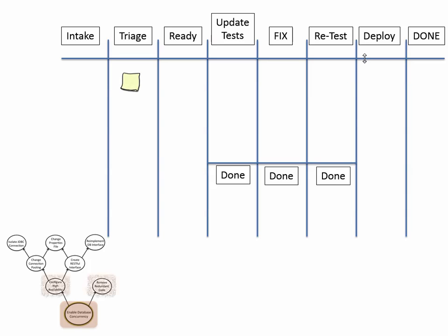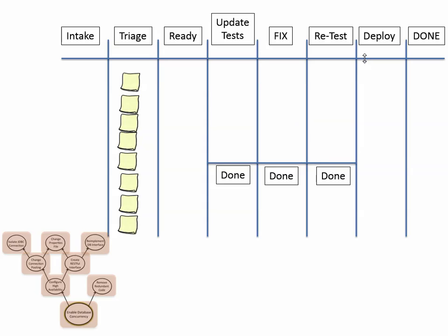I go ahead, make my change, see what failed my tests. I got a couple items out of that. Put those as 2 new items on my Kanban board, so I know how to manage those, revert my code. All right, now I start investigating down the tree. All right, cool. I picked up another 2 items. Well, not so cool. I really would have preferred not to have had leaf nodes at that point, but I picked up a couple more items, added to my Kanban board, make sure they're on my graph, right? Revert my code, and then of course I pick up 2 more when I investigate that side, and then finally pick up another one when I go that side. So we get a feel for how things kind of lay out.